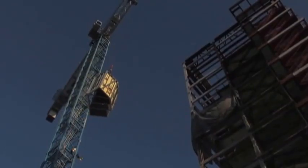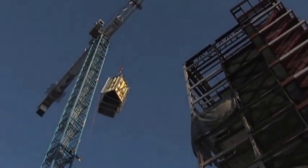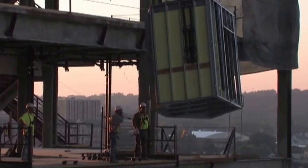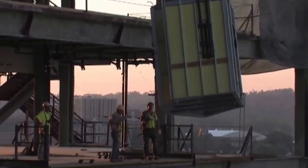This gave us really an opportunity to get way ahead. We were able to go ahead, start rough-ends probably 6 months ahead of schedule before we normally would have. Kind of reduce our manpower on the job. I'd say the prefab was less man hours, or less people on the job. It was safer, it was on the ground, not as much equipment required, no ladders, no lifts, no harnesses. We saved more material, and it was quite a bit faster.